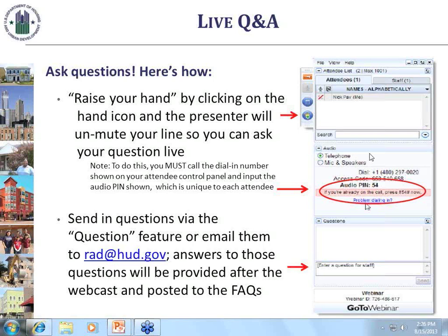Yeah, except that there's no artificial standard, right? It really is based on the physical assessment. Yeah, right. It's all based on the assessment. But other than that, there's nothing that we require like an operating reserve. We don't require any type of operating reserve or initial operating deficit reserve, nothing, only a replacement reserve. Now, separately, if you're doing tax credits, your tax credit investor may impose those types of reserves. But generally, if it's a simple rehab job and you're just getting FHA financing or something, there's nothing that you need to do other than a replacement reserve. Okay, thank you. Sure.